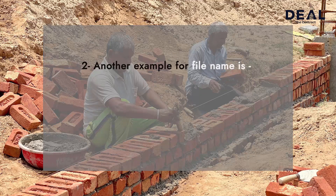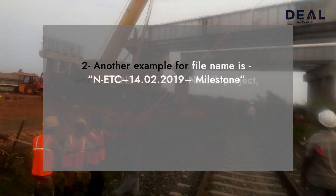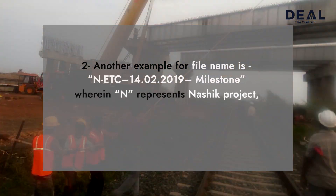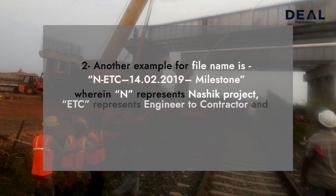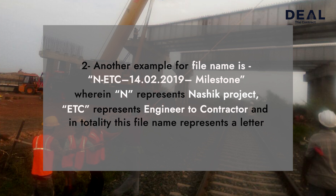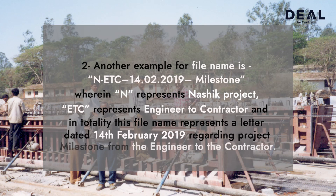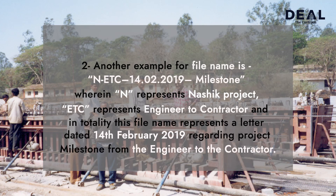Another example for a file name is N-ETC-14 February 2019-Milestone, wherein N represents NASIC project, ETC represents engineer to contractor, and in totality this file name represents a letter dated 14 February 2019 regarding project milestone from the engineer to contractor.